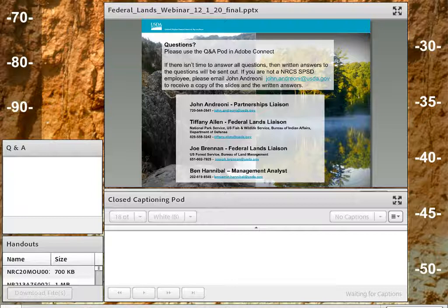And I would say no. If you're modifying an existing interagency agreement, the statement of work in that agreement has agreed-to items. So if different things come up in the course of the project, you can modify the statement of work if you have an interagency agreement. So I don't think it's absolutely necessary.